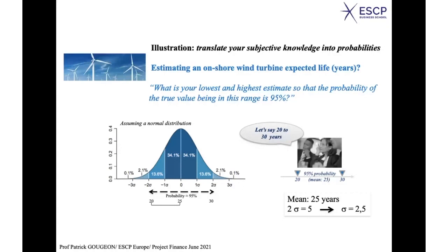That's why when you develop this type of simulation, make sure you don't do everything yourself. In using and playing with your Excel, you need to find for each parameter the expert, the person you consider has the strongest legitimacy to tell you numbers and to give you an opinion. The worst situation is when people are just playing with their Excel table.